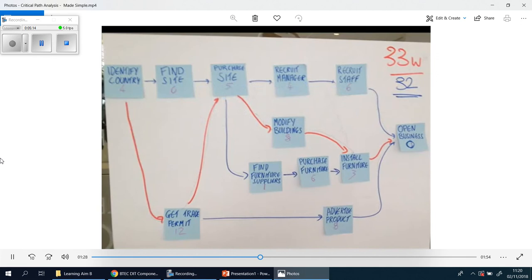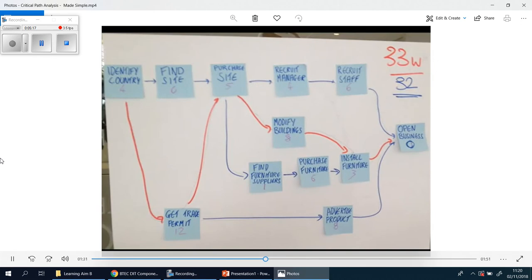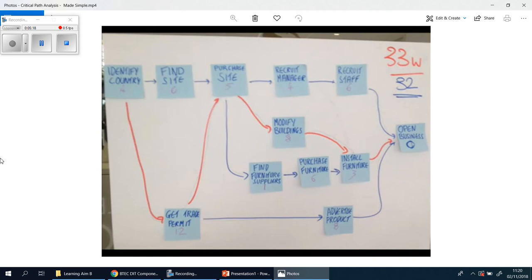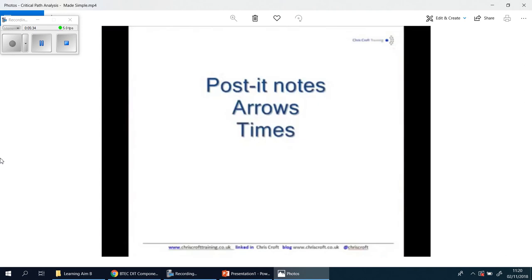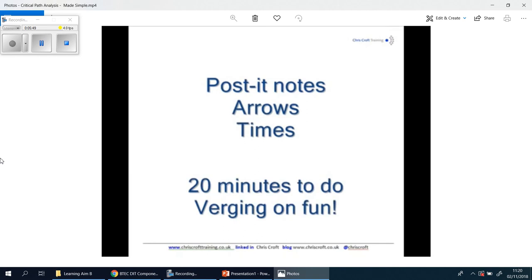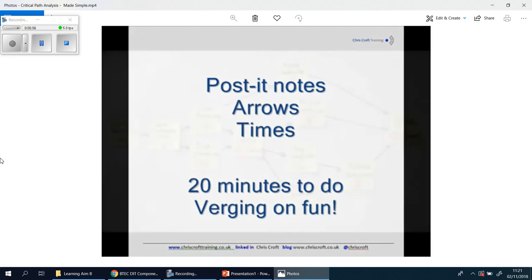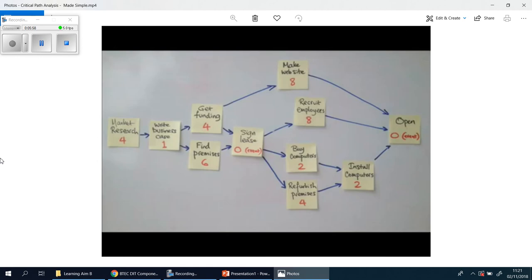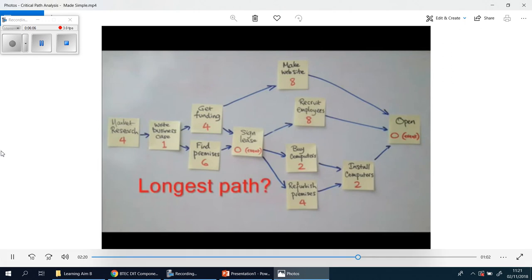The way to get the critical path is to do as follows: Write each task on a post-it note and stick them on a big bit of paper or whiteboard. Put the arrows on connecting the tasks and put the time on each task—how long you think each task is going to take. By the way, that's not the hours of work, it's the elapsed time. So if it's a five-hour job you think will take a week, put a week. Once you've got that diagram drawn out with arrows and times, you don't have to do the forward pass, backward pass, and float. You just look at the diagram and look at the longest path. Can you see the longest path?